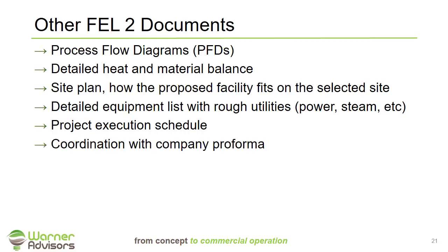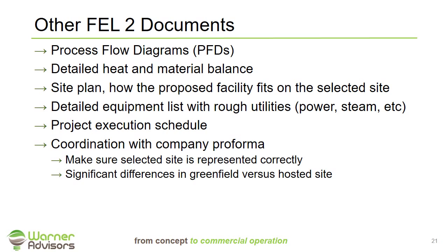And it's important to coordinate with your company pro forma. Make sure that as you learn more items as you go through various phases of engineering, that you feed that information back to your company pro forma and make sure what you're telling investors and outside groups is consistent with what you're planning for the engineering of your facility. You need to make sure that the site is represented correctly in that analysis, and you also have to evaluate the differences between a greenfield build or a hosted site.